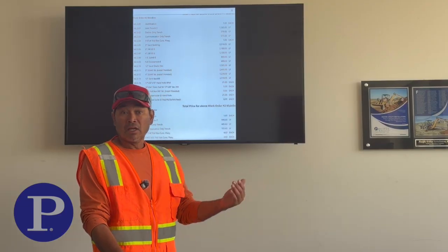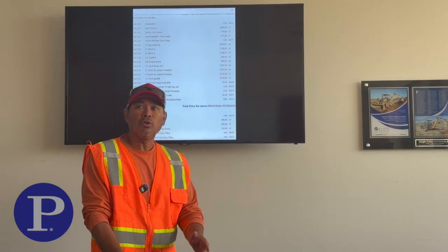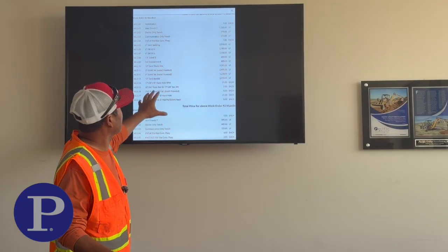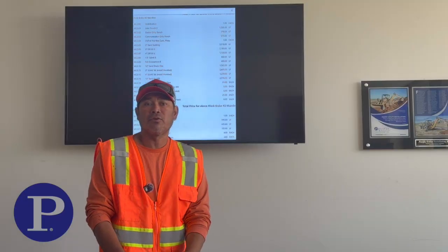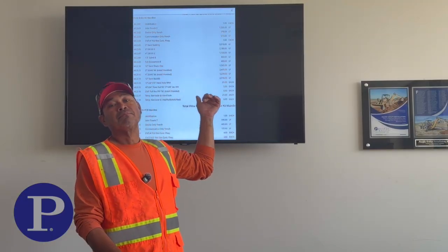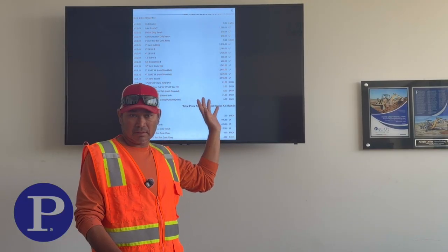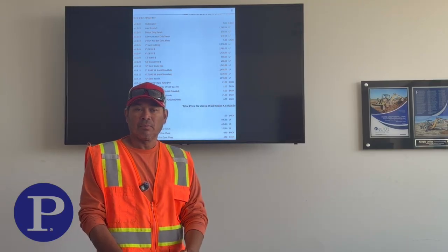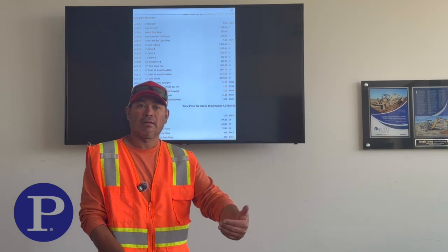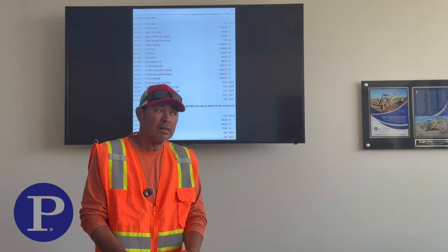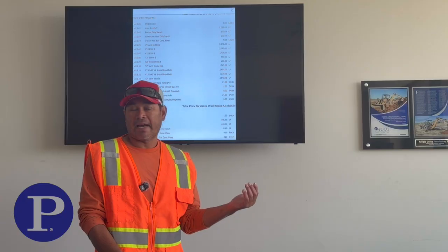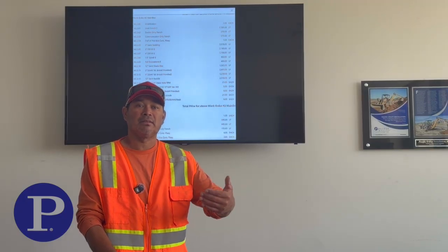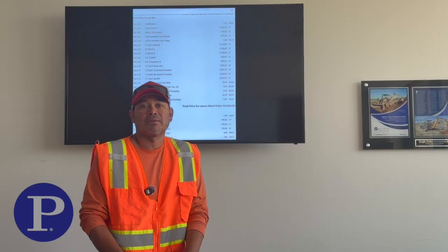What else can I say? Glue. With glue, we are not really limited to say this is the amount, but for this specific work order right here, I'm gonna tell you 4 gallons of glue is gonna get you really, really close. It depends if the guys are gluing in a regular method of gluing. I say if you order 6, it's not gonna kill nobody, but you have to take into consideration that sometimes you're wasting. It's gonna be against us too.